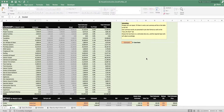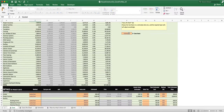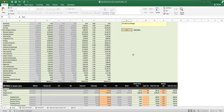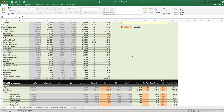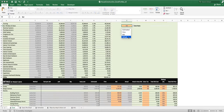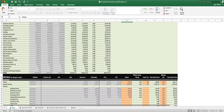Let's give a quick idea of what we're going to do. I'm going to start with the Estimated tab here. This is for when you're just trying to estimate how much your house is going to be. Then if you get a verbal quote from subcontractors that's more firm, you'd use that next tab. This will help you keep track of how your costs have been updated as you move through the project. Then you may get a written bid, and you'd also have a place to put in your actuals — which would include any change orders — and you can see all the totals being updated.